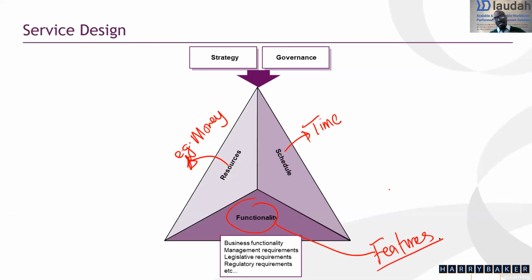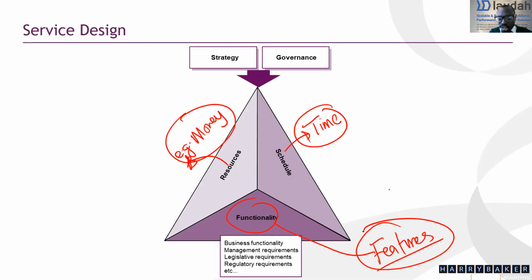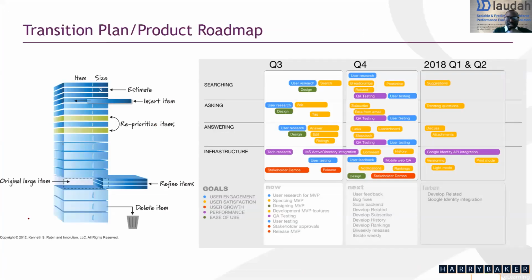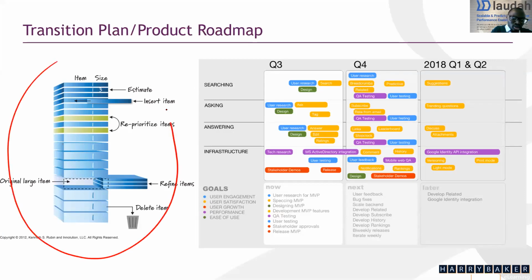Because you see, these guys, the business analysts, the UI UX, the DevOps, the coders, we need to sit down together to work together, to think, what can we do, given the time, given the resources, and how many features are possible at a particular time. And this is where progressing iteratively can come in, all right? And normally for people that are used to Agile, everything goes into a backlog. We then need to prioritize. What can we do first quarter? What can we do second quarter? What can we do third quarter? Because we cannot do everything all at once.